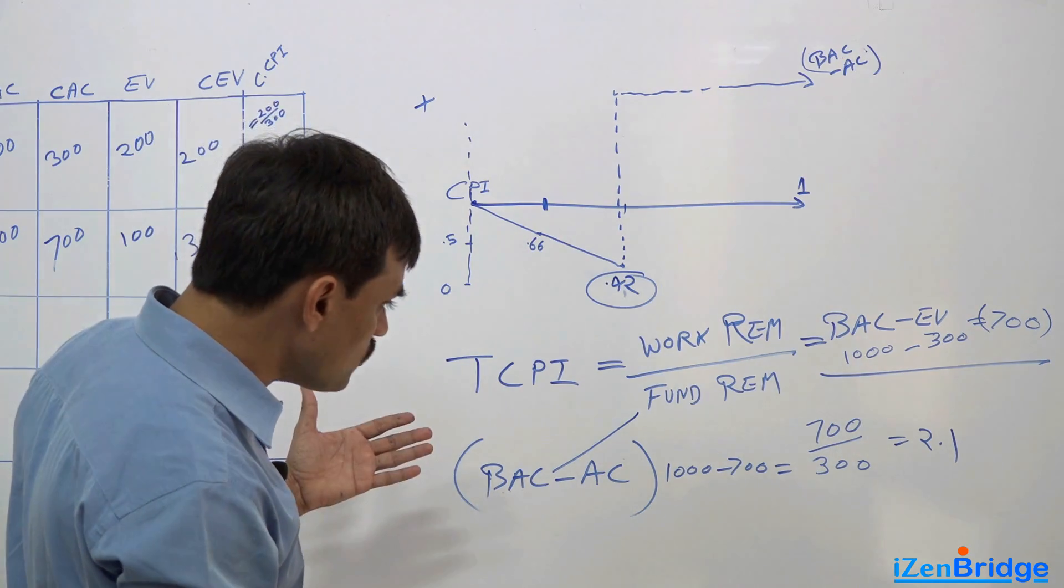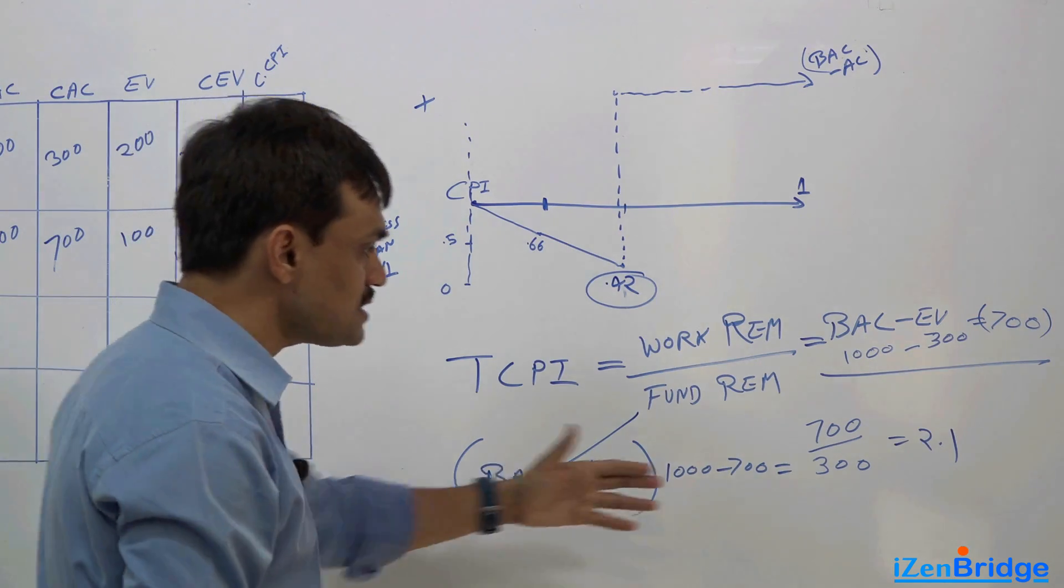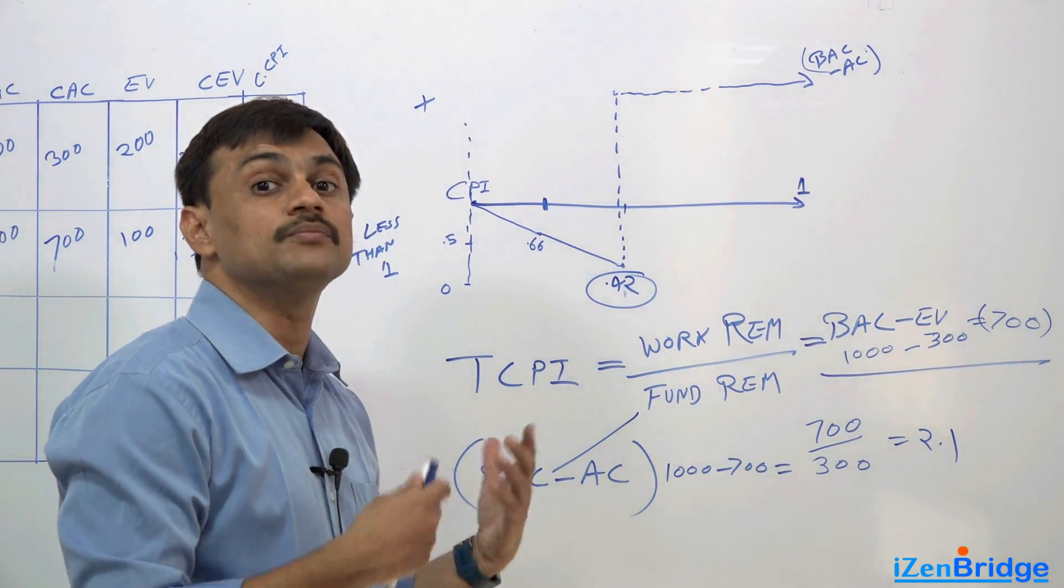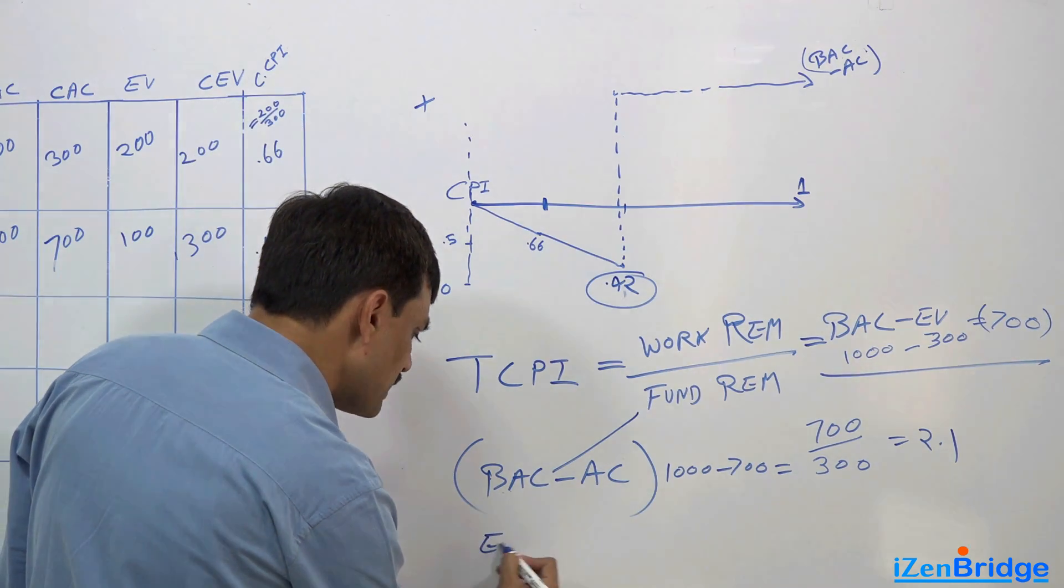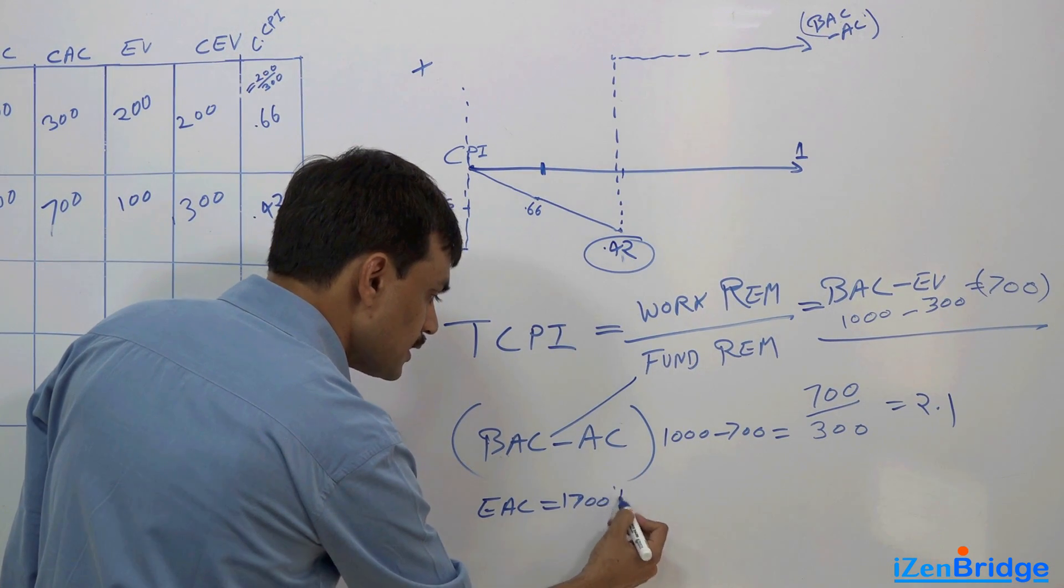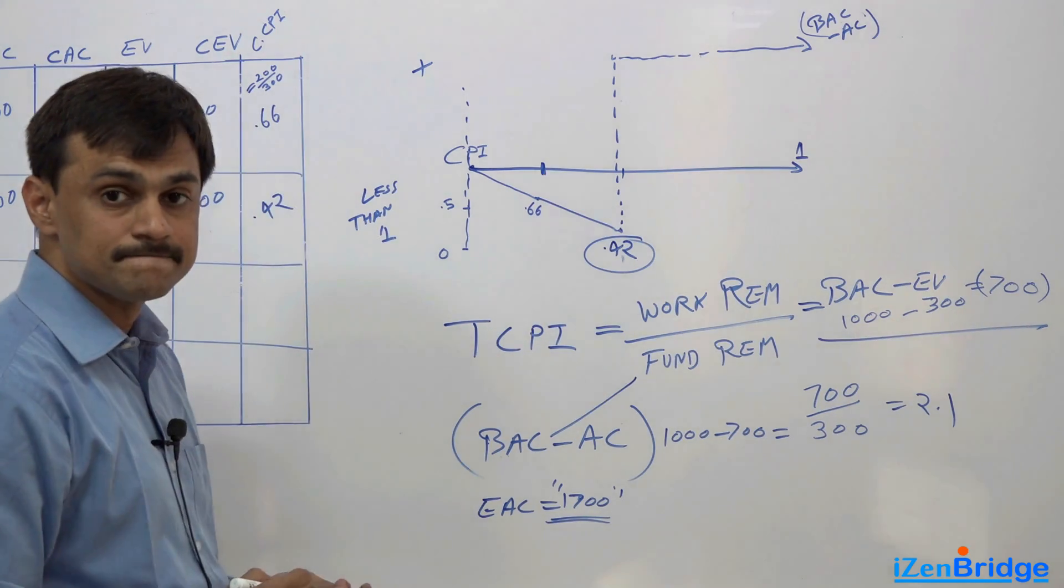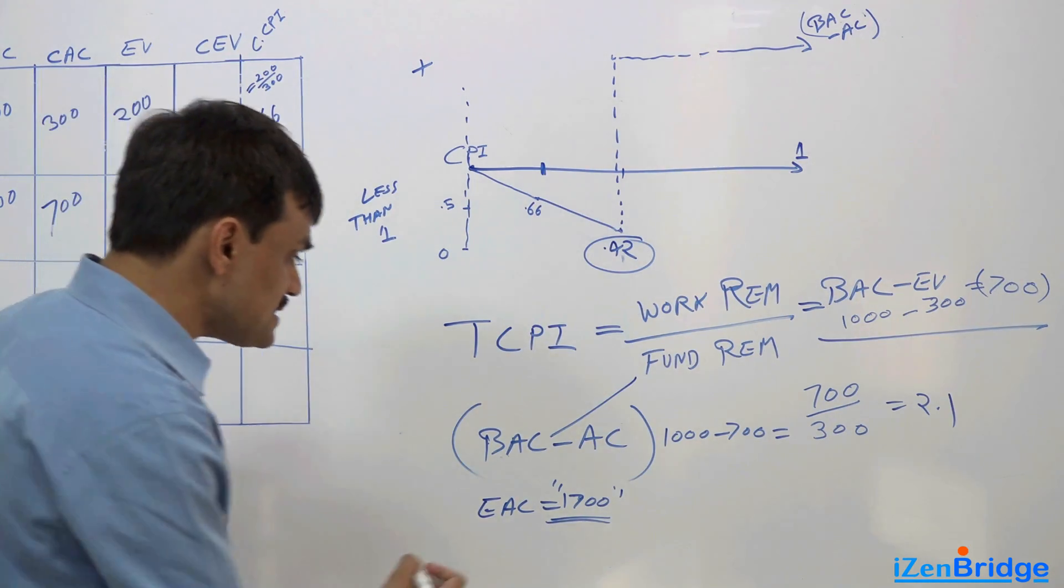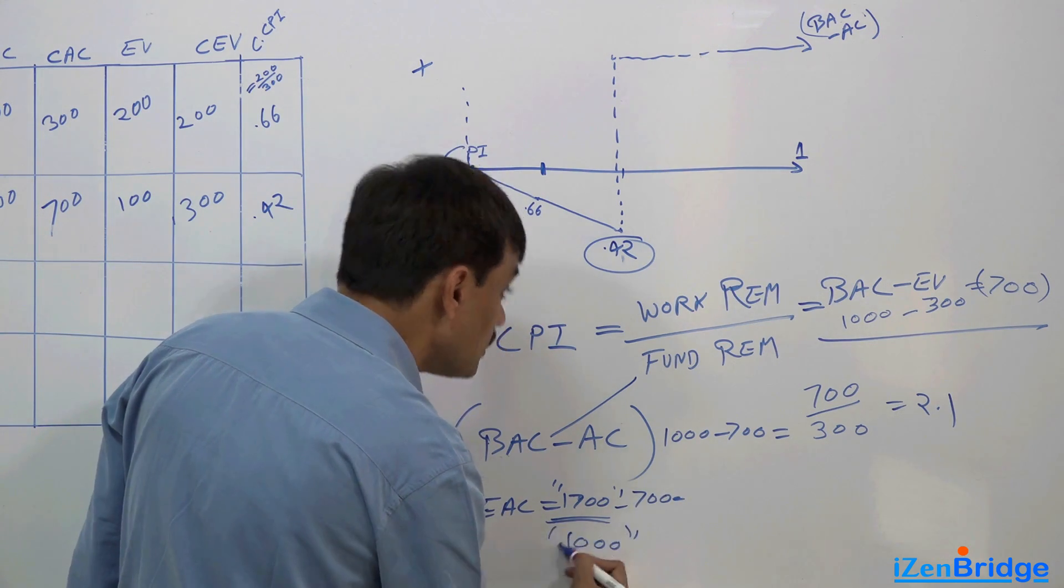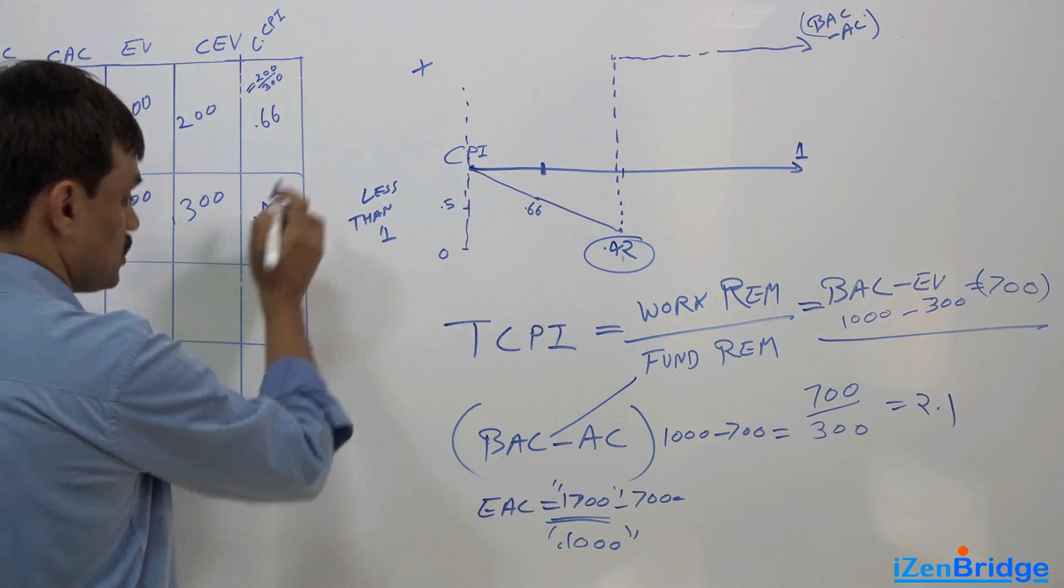So our remaining work was $700 and our remaining fund was just $300. What if our management gives us $700 more? So it says I give you more money - estimated completion I give you $1,700. Can you take care of the work now? So when we get more money, then $1,700 minus $700 I have spent - I say I have $1000 left.